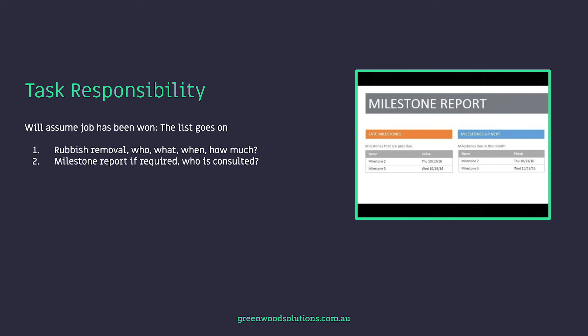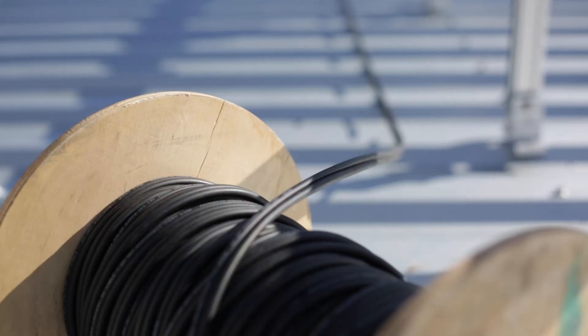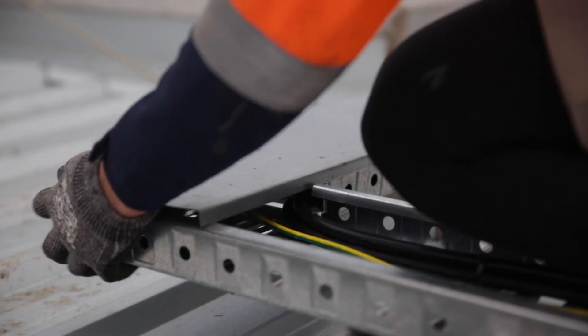Milestone reports are required on bigger projects. A milestone report might cover: install the feet, rail, and run the DC cabling — that's milestone report number one. Number two might be running the tray, putting the DC cable into the tray, closing the tray, and installing and checking the panels. It's simply a process of detailing what tasks were done, when they were done, and what the next task will be.